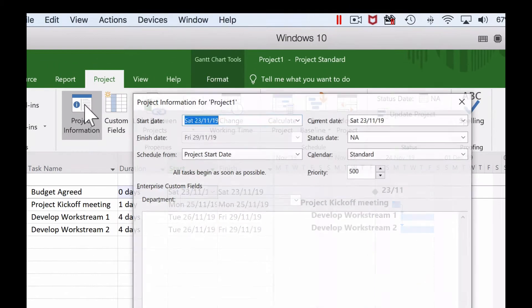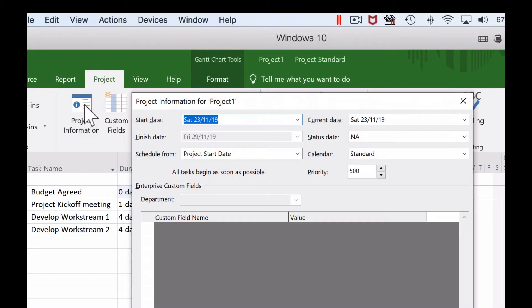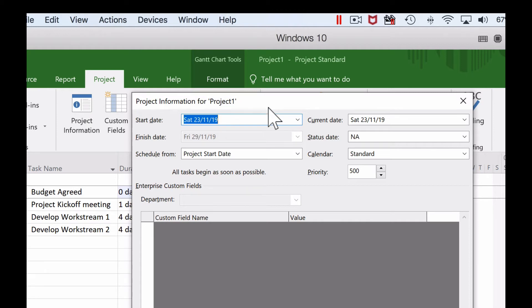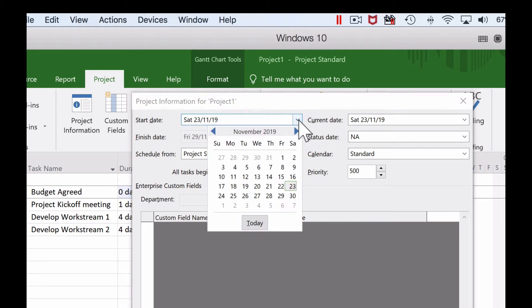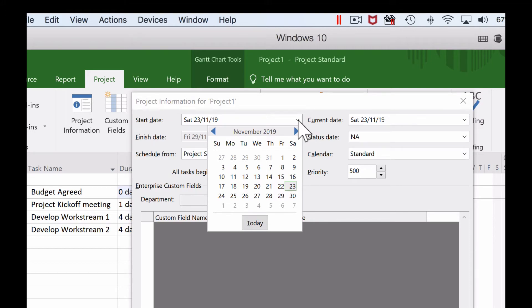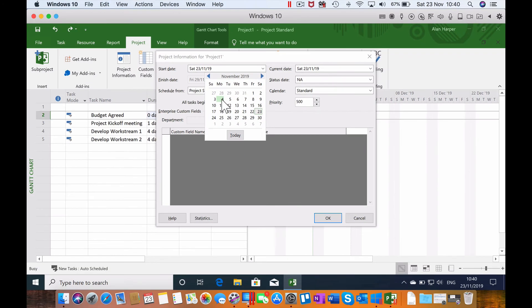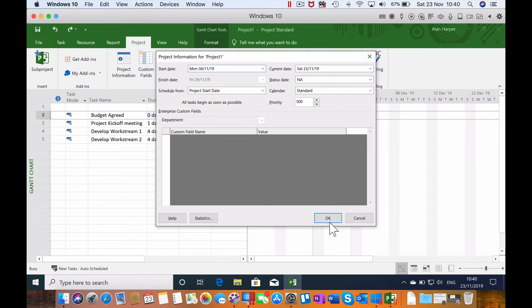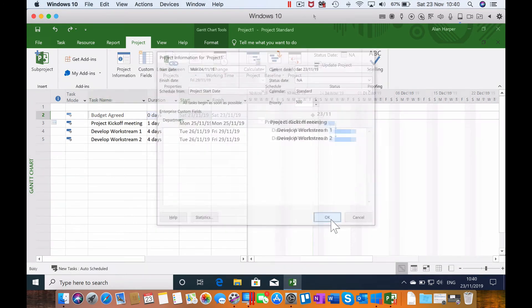We're presented with various information about the project, including start date. Sure enough, the start date is the date when I created this project plan, Saturday the 23rd of November. By dropping this start date down, we get the usual Microsoft calendar and we get a chance to choose the date when the project started. I added a task that was on the 18th of November, but let's imagine that the project actually started at the first Monday of November, which was the 4th. Selecting that and clicking OK, nothing much terribly happens.